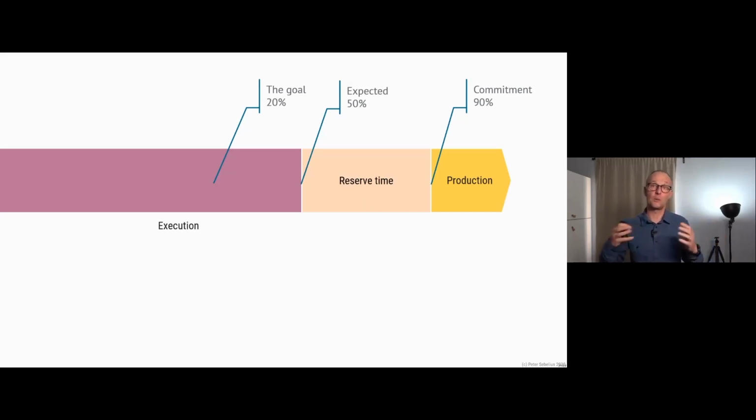So if anyone asks you, in a project management role, when are you going to finish? You can say, do you want to know the date where I can really promise it to you, or do you want the aggressive date? And they say, I want the aggressive date. I'd rather not say, because there is quite a high risk of failure, but I promise you that I will chase my team members as hard as I can to make them perform above everyone's expectation. Is it okay with you if I tell you about the commitment date, and you trust me that I'm doing my utmost to get this project where it should be? Most of the time people say yes. And then you give them the commitment date, and they rest assured that you're doing everything you can to keep the efficiency up in the project. Try that the next time you have that communication. Ask what likelihood they want me to work with when I give them a date, and see what happens.